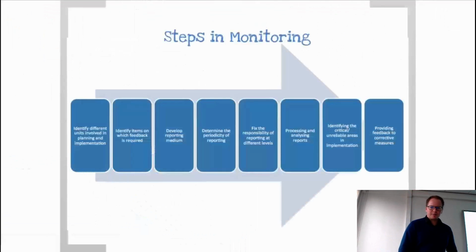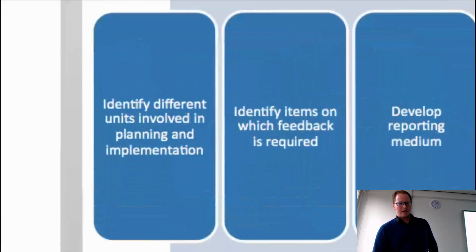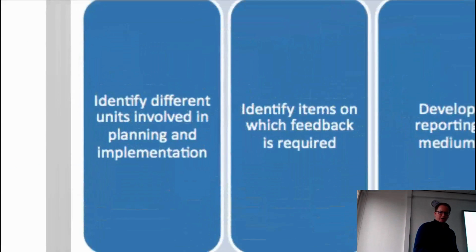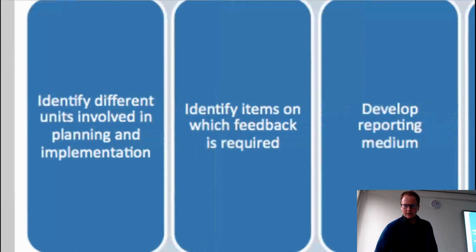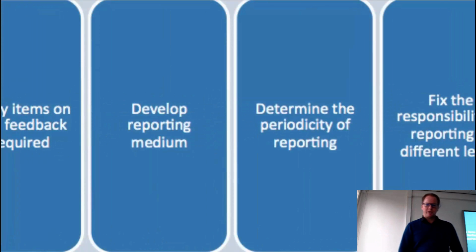So, steps in monitoring, and this is specifically for sustainability. Identify first of all the different units involved in planning and implementation. Identify the items for which feedback is required as well. And then develop a reporting medium, and determine the periodicity of the reporting.